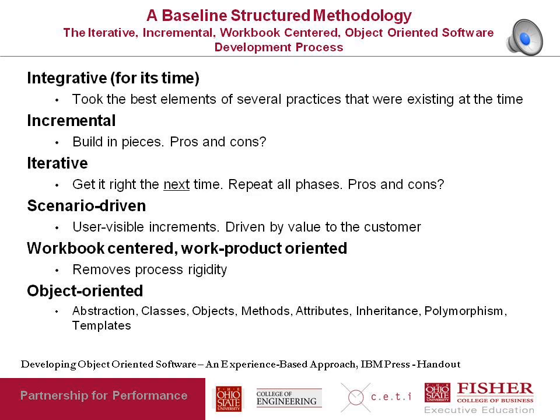The second principle that this structured process followed was an iterative principle. Iterative is similar to incremental, in that you want to build it in pieces, but iterative adds on to incremental by saying that you can revisit any of the phases during every iteration in the building of the system. So incremental simply means building it in pieces. Iterative means you can start with requirements and go down through deployment and testing for every phase. So if you didn't get it right this time, you could get it right the next time.